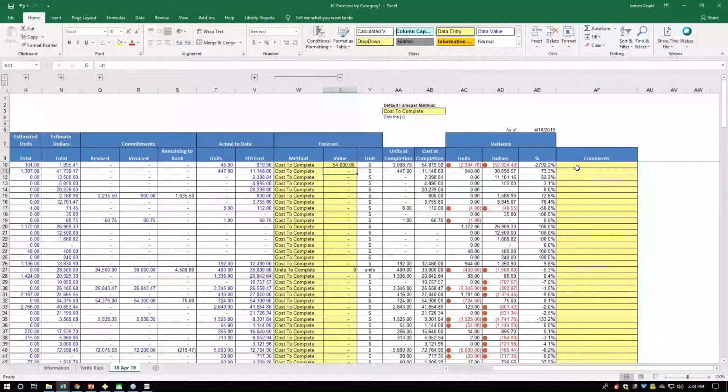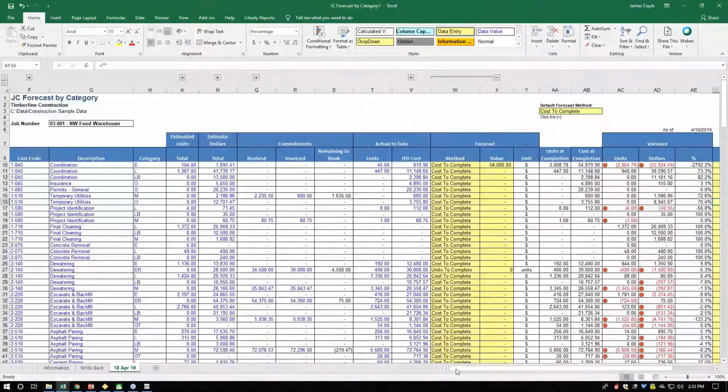And we added another element that you could put in. The project manager, the operational person, can put in what they're thinking, right? Because why? What's the reason? And you can now review the project. You can also use the same one to refresh the data next month, and I'll have last month still here, but now I'll have the current month. So I'll have all my historical months all in one workbook. This is one way you might do forecasting.